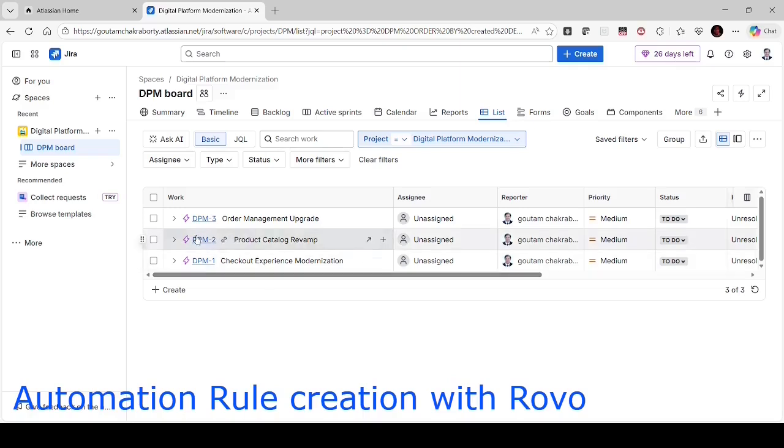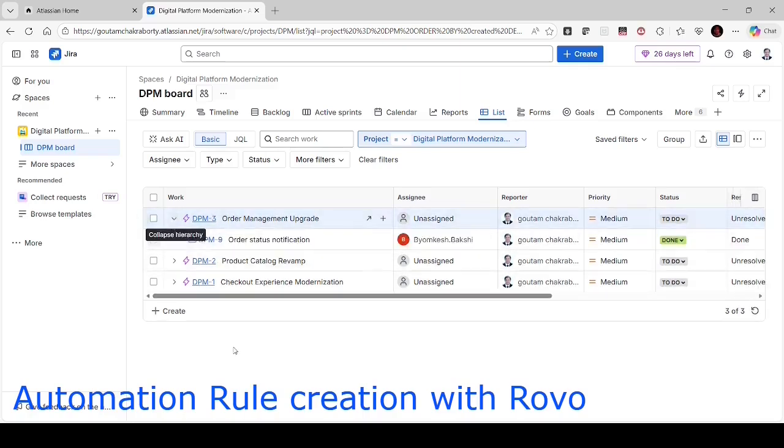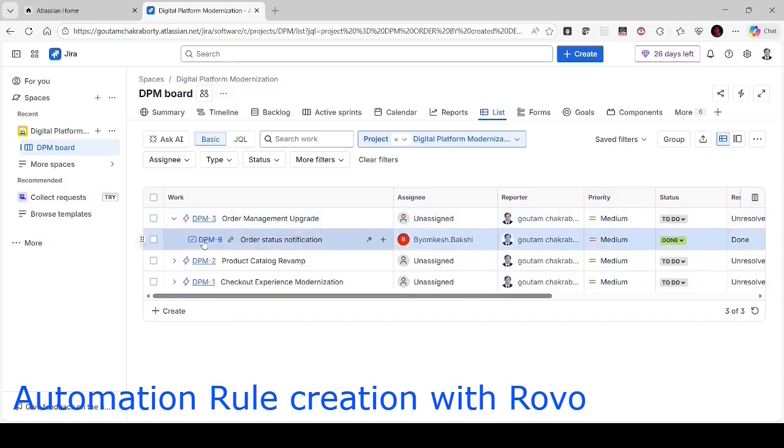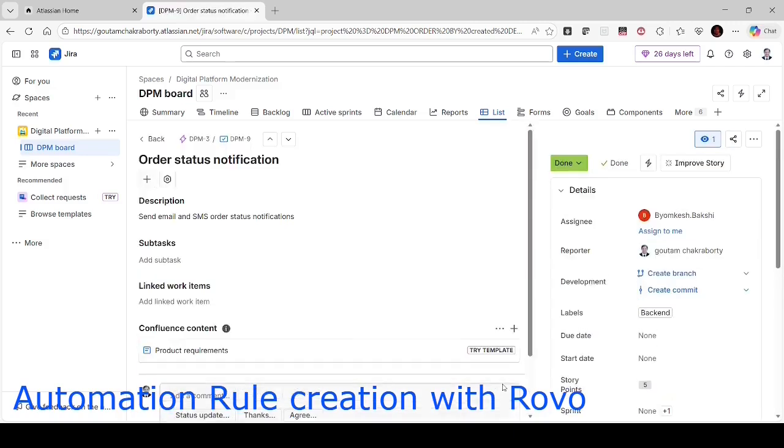Now, in this project, I have designed the stories in such a way that whenever a user story is created, we shall associate one label, which will indicate the type of work. It should be either front end or back end or QA, so that whenever the user story from the backlog moves to a sprint, we shall be able to identify to whom from the assignee list I can assign that user story.